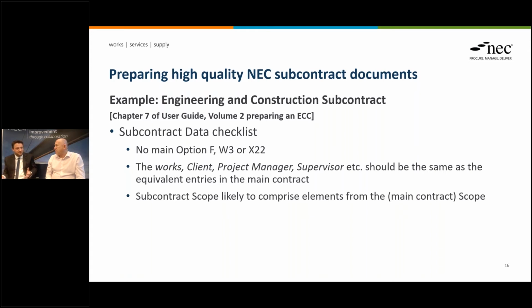If we use the codified structure suggested at the ECC level, so we've got our scope, for instance, set out in a really nice coded structure, it will help immensely, because I can almost see the contractor then highlighting by different colours the bit that they're going to break into different packages, and then building their packages off that. So there are no gaps, no overlaps. So follow the codified structure, write something incredibly precise, and be highly professional.